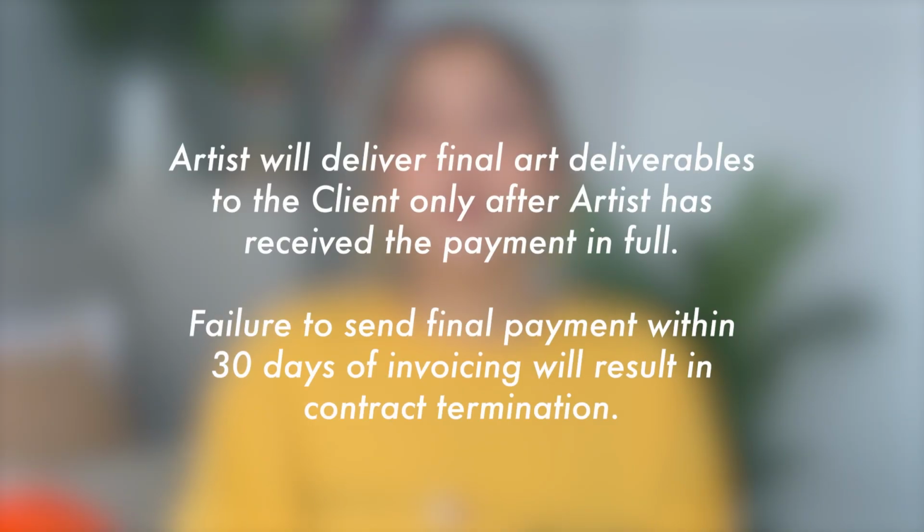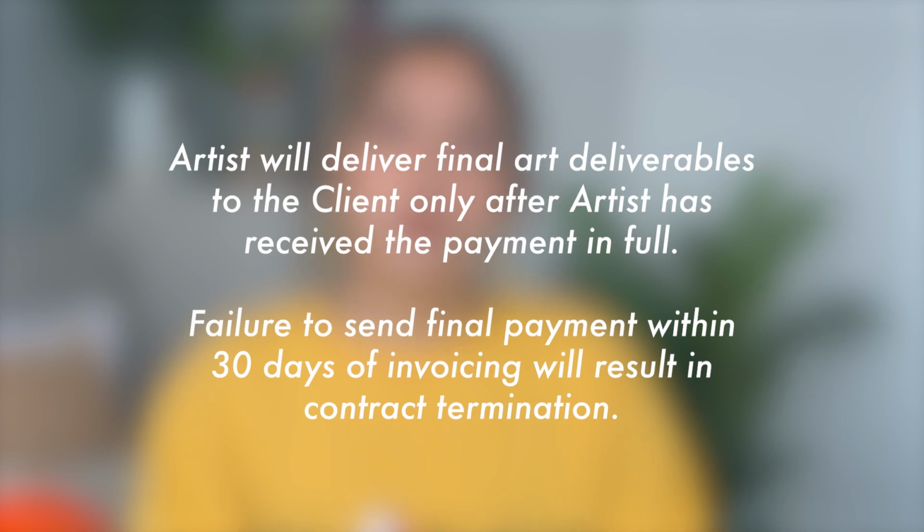Kind of like, you're keeping the art hostage and you have to carefully swap the art for the cash, real slow-like. Artists will deliver final art deliverables to the client only after the artist has received the payment in full. Failure to send final payment within 30 days of invoicing will result in contract termination. Obviously, it's a lot safer for you if you can be paid at the beginning of the project, which is pretty common for commissions and other small jobs. However, if this is a high-paying project, the client likely won't agree to it since it's a big risk on their end as well.